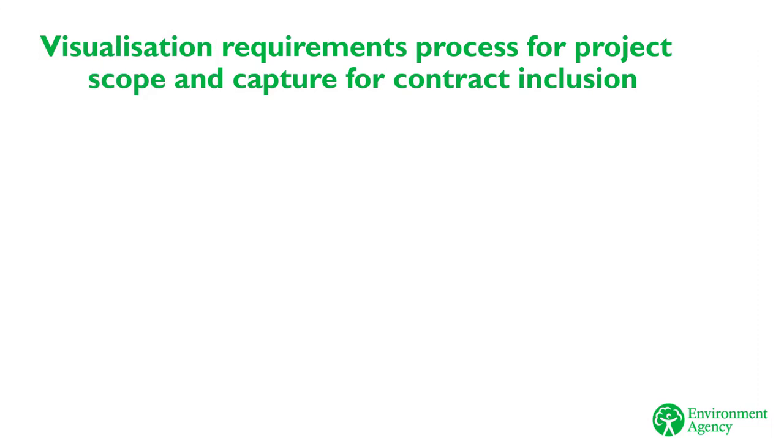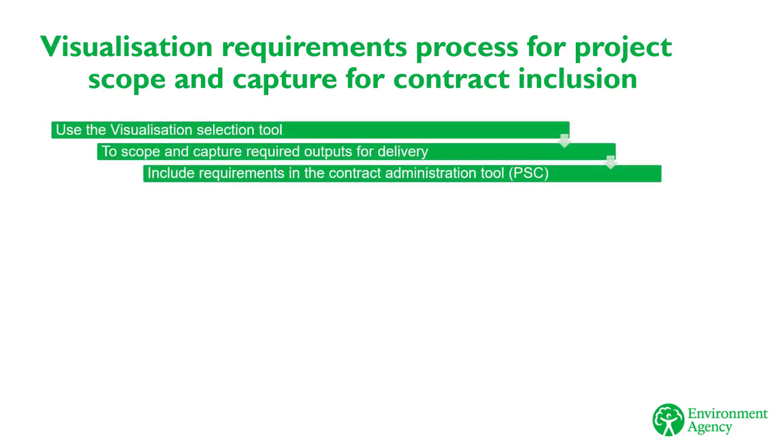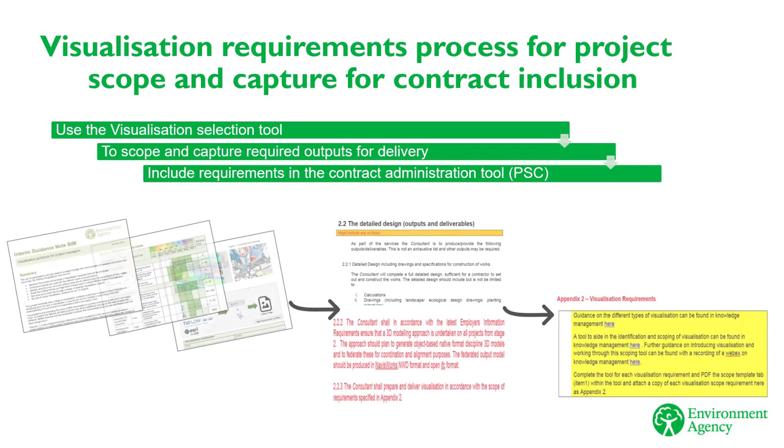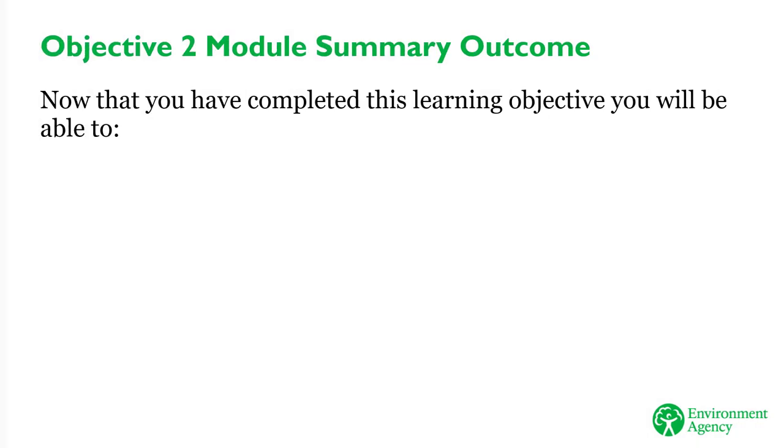When you complete the tool, it is vital that the information is transferred from the tool to the PSC documents. This will ensure scope captures the outputs and deliverables for visualization requirements. Please make a PDF copy of the completed visualization selection tool for insertion into Appendix 2 of the PSC visualization requirements.